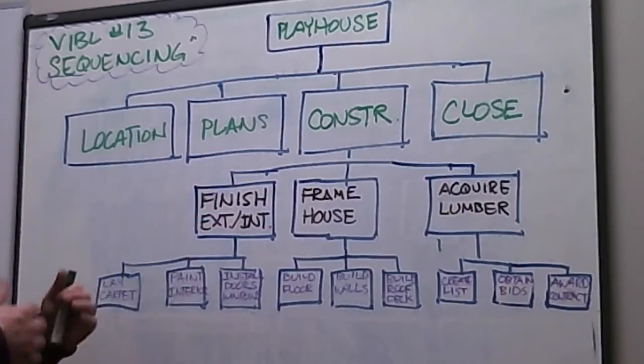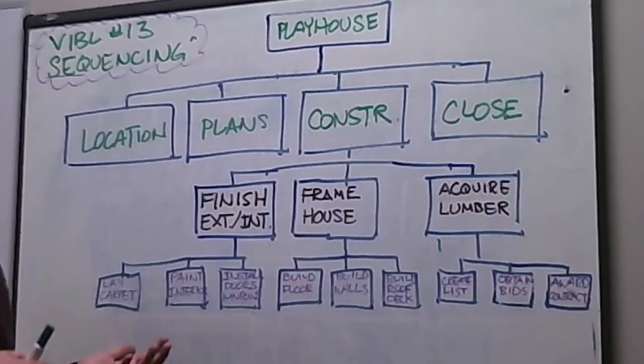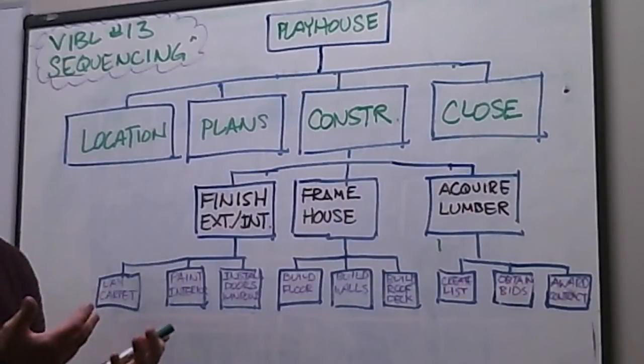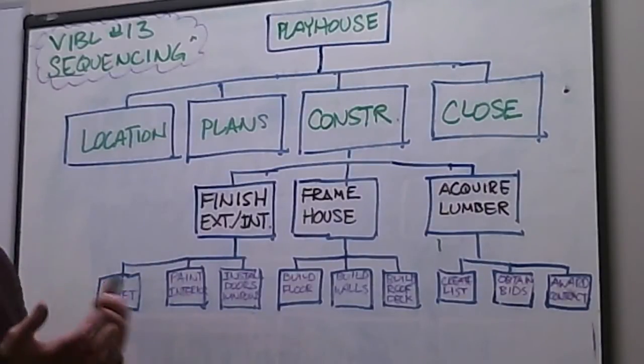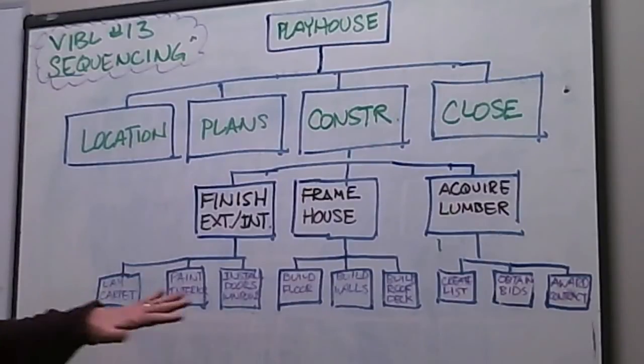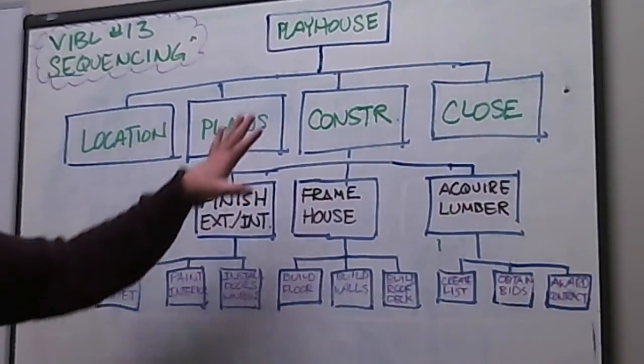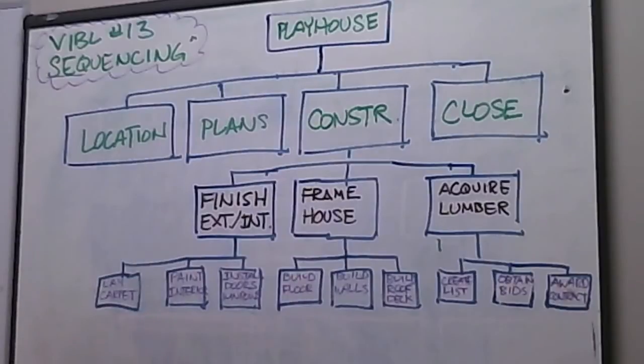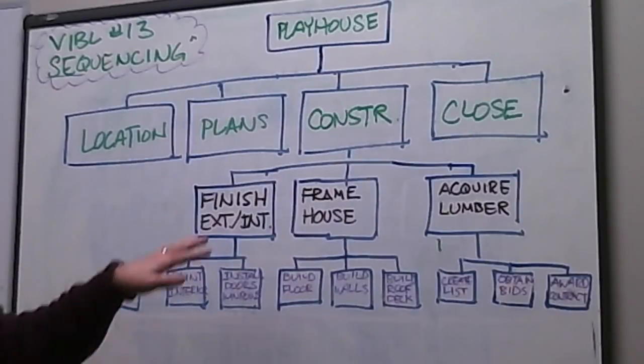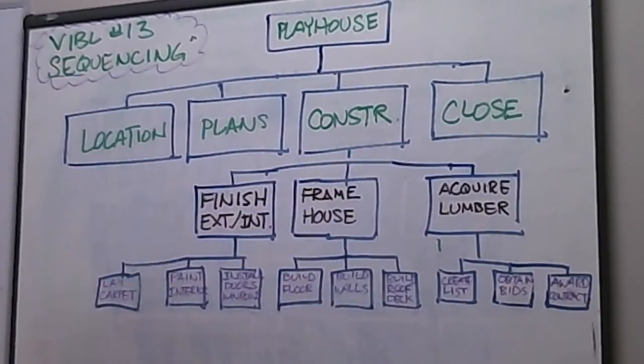When we finish, finish exterior and interior is in the line of laying carpet, painting walls, installing doors and windows. That essentially is what I'm doing in breaking down the construction summary task of this particular project: establishing the work packages and then the activities that support those work packages.